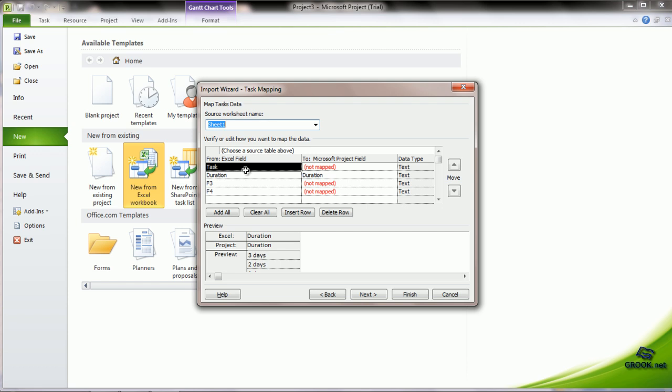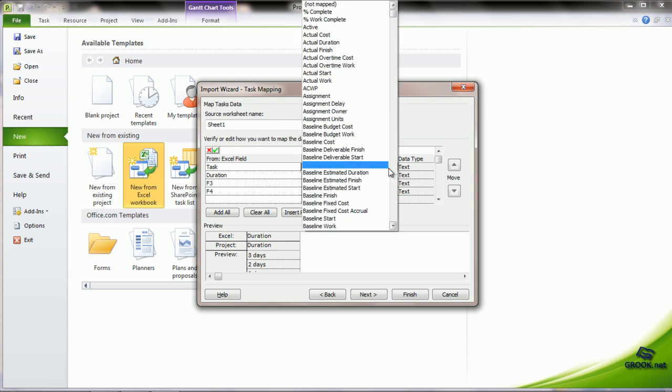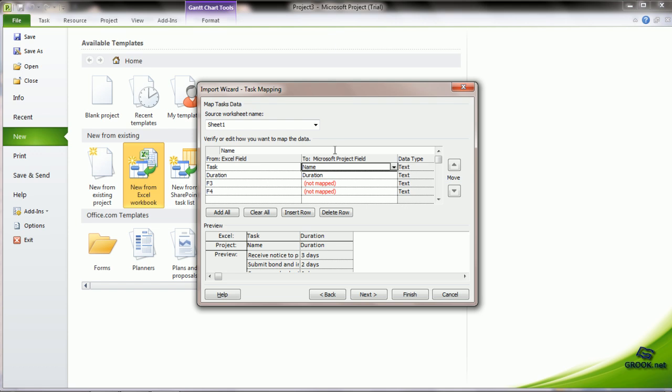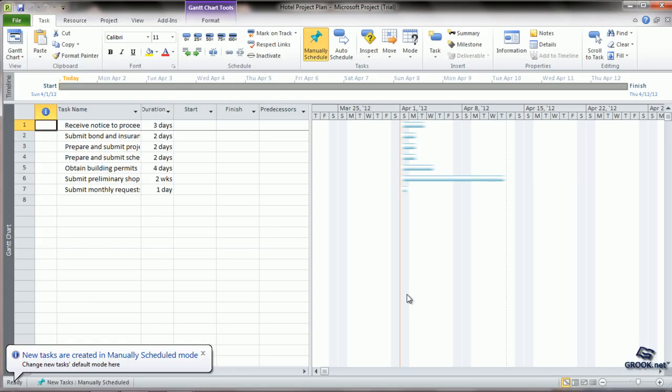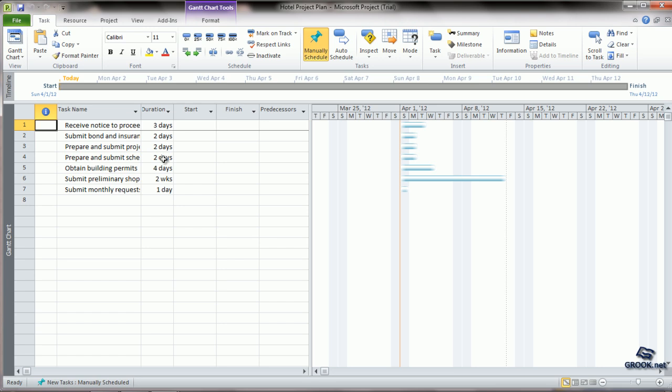Now, it asks us where to map. For example, the task field in Excel has to be mapped to which field in MS Project. So we click here and from a list of all the names possible, we choose the task name. Duration is automatically mapped as duration as it has the same name. We say Next and Finish. Now we see that the Excel data has been imported into MS Project with the task being mapped to task name and the duration to duration.